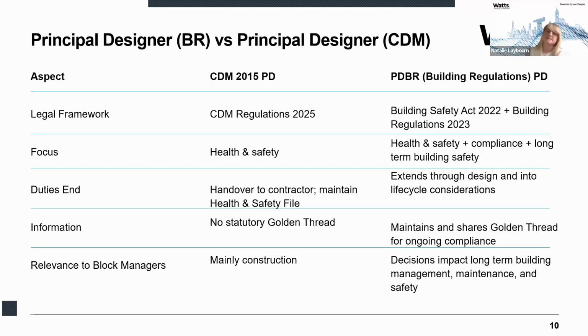It is also worth noting that the same individual can act as both the CDM principal designer and the principal designer under building regulations, provided they have the necessary competence. Competence means having the right knowledge, skills, experience and behaviours to carry out both sets of duties effectively. As block managers, it's important to check competence, for example by reviewing CVs, project experience, references or professional memberships to ensure that all duties are carried out safely and in compliance with the law.